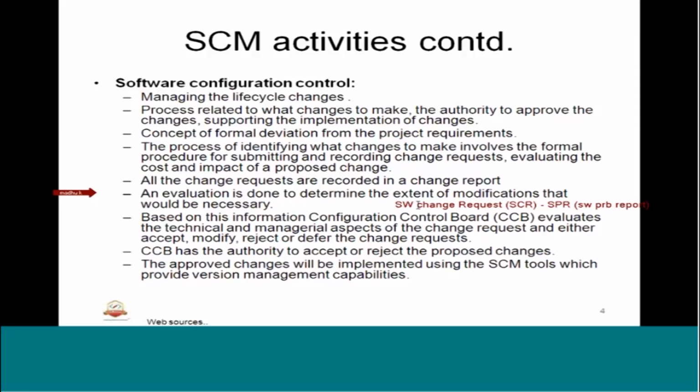So once an SCR is prepared, or all the change requests are recorded in a bug, an evaluation is done to determine the extent of modifications that would be necessary. Based on this information, the CCB, or configuration control board, evaluates the technical and managerial aspects of the change request, and they either accept, modify, reject, or defer it. The CCB has the full authority to accept or reject.